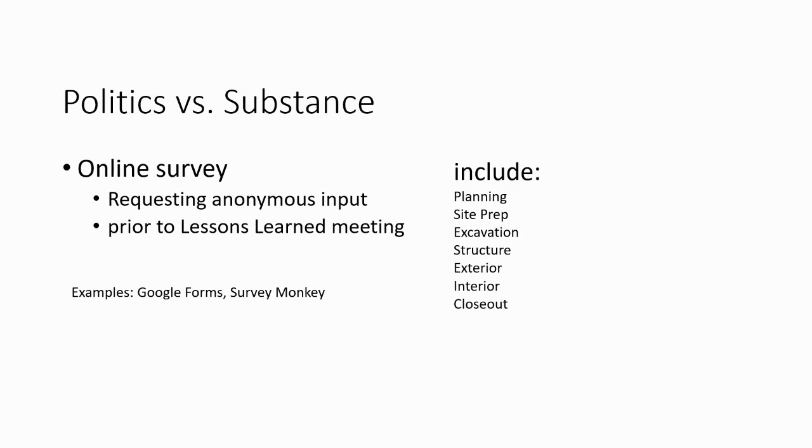Three key questions should be included as part of the survey: what went right, what went wrong, and what needs to be improved. To make it useful, the things that went right and those that went wrong, all of these should be classified with causal information.